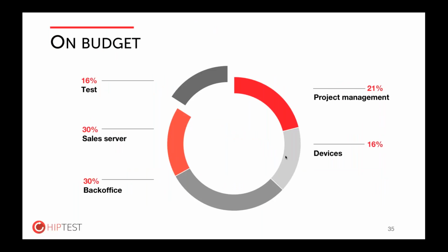Okay. So if we speak about budget, the cost of testing in the global budget is really close to what we have in the project at Parkeon, the project that does not use BDD. We have 16% of the budget dedicated to testing. So it seems that BDD has not brought us extra cost, and moreover, we have a happy customer who was delivered on time with quality software. Which is maybe the most important.